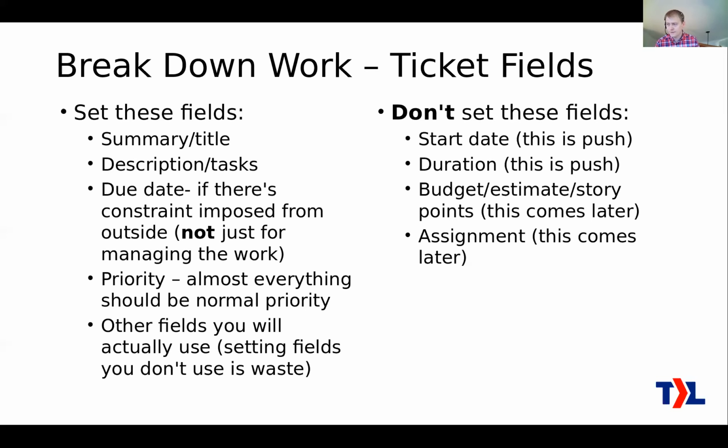Now here's some fields that you don't set. Let me save you some work. You're not going to set the start date. I know that your PSA has a field for setting the start date. Don't do that. That's push, as opposed to Kanban, where you set up the work and then you let the engineers pull it as they're ready. You don't push the work to them by setting a start date and then telling them when they got to start. You don't set the duration. That's kind of another variation on push. Don't set the budget or estimate story points, stuff like that. That comes later, and don't assign it to anybody. We'll do that later.